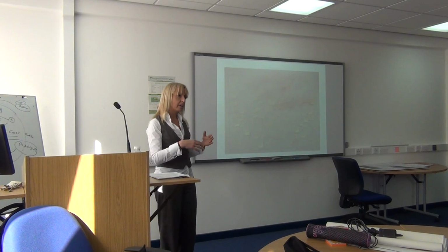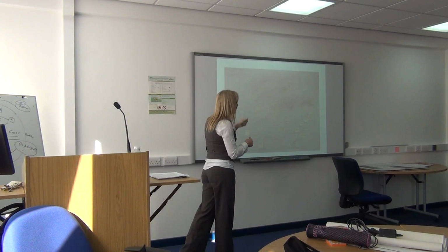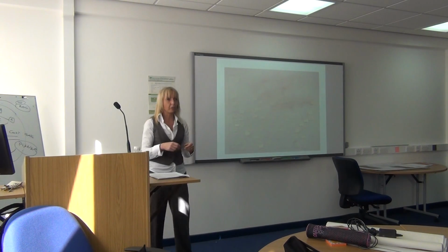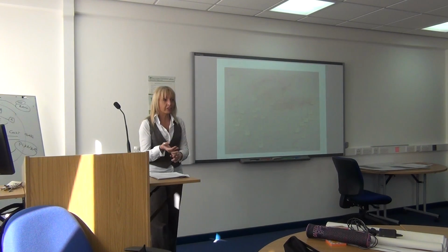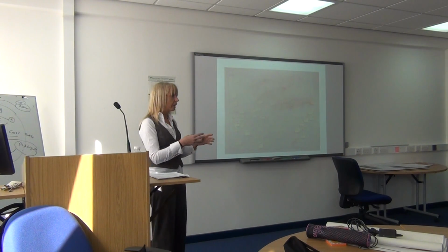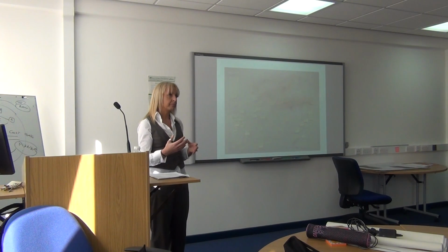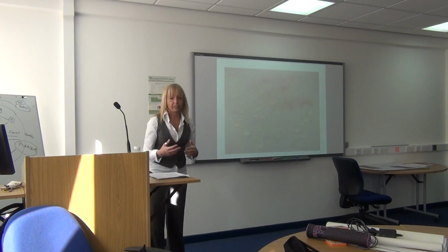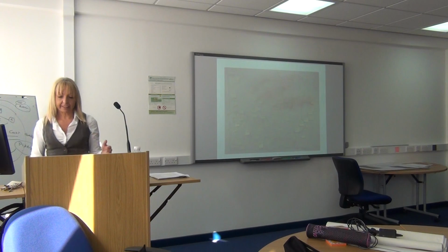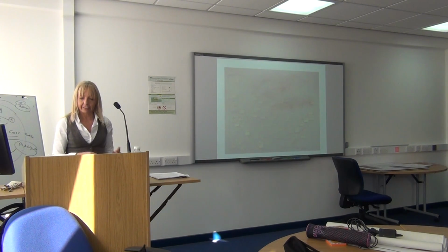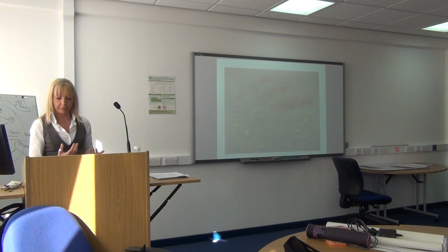And therefore, by identifying them, you can then move these people up into the appropriate quadrant, because you then believe that these people are privy to a lot of information, they network in the right circles. It's just that they've been misplaced or not identified previously. So this enhances their potential power, the potential interest that they have in the project or in the strategy.